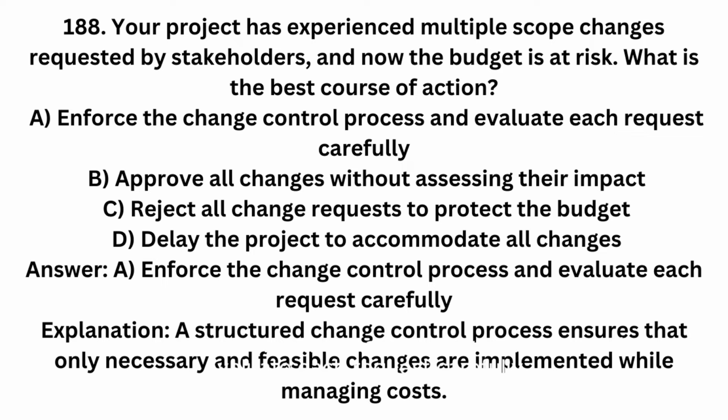Answer. Enforce the change control process and evaluate each request carefully. Explanation. A structured change control process ensures that only necessary and feasible changes are implemented while managing costs.